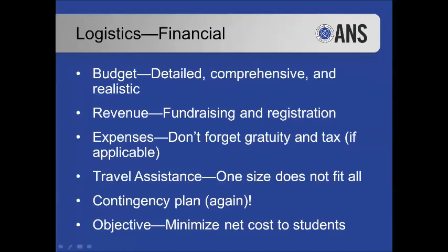Expenses, again, those are pretty much self-explanatory, but the thing I do want to highlight is don't forget, there's a lot of things that people can forget, such as gratuity and also possibly tax. We'll get to tax in a little bit, but sometimes it can be applicable. Don't forget to include that.